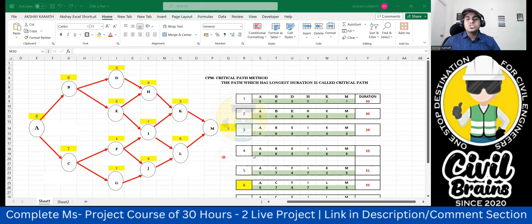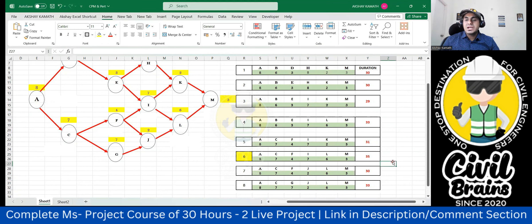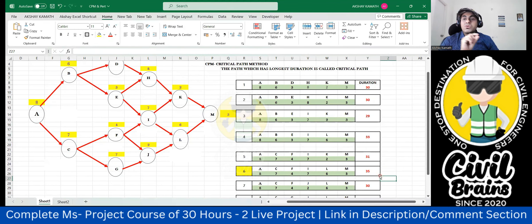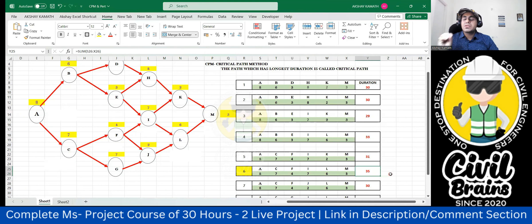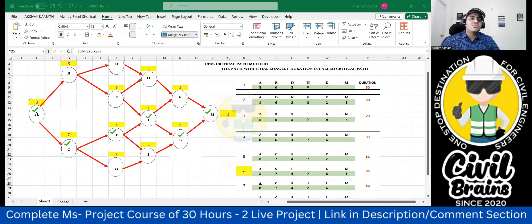Now, out of all the path durations — 30, 30, 29, 33, 31, 35, 30, 33 — the highest is 35 days. So this is the critical activity and 35 days is the total duration required to finish all activities. The critical path is A → C → F → I → L → M, taking 35 days.